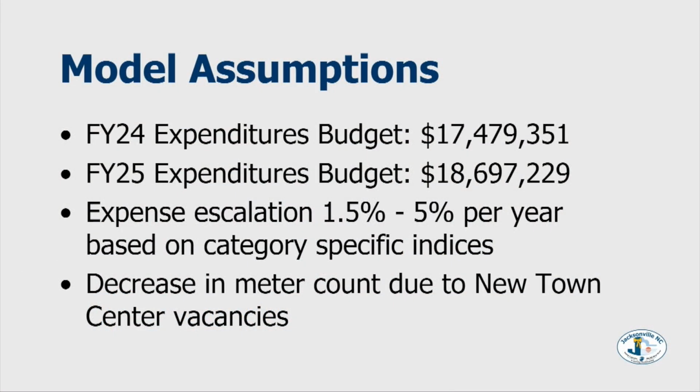Okay. So as Wally said, we use the CIP to help look at where the water and sewer rates are. We use the rate model and the CIP together to determine the water and sewer rates. In addition to the CIP, we also enter into the rate model meters, usage information, and meter counts, which predicts revenues. We enter in budget for expenses, debt service, all of that goes into this model. And then we are able to move the CIP projects accordingly to try to help keep the rates as stable as we can. That's the general idea of how the rates are set in the rate model.